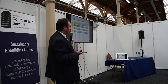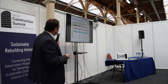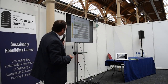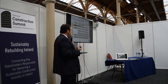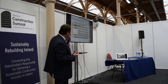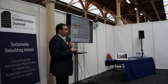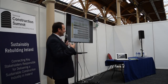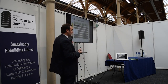So the owner will develop what they call the owner's project requirements, and then the design team will respond to that with a basis of design. These are 2 live documents that travel throughout the whole project. As design development proceeds, the initial commissioning plan is developed by the commissioning authority, and then there's a 50% review of the OPR, or what they call the owner's project requirements, and the BOD and the project design. If you're going for any of the enhanced credits, this is the stage where the systems manual outline, which is the real benefit to the actual operator, starts to get prepared, and the training requirements get locked in. And the key part of all this is to make sure that you can get these requirements in at tender stage before the documents go out, because you can get that value.